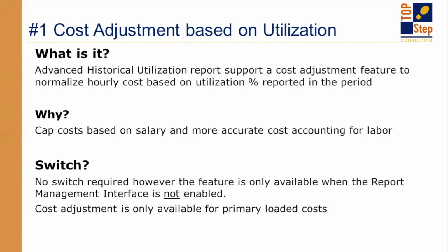I hear a lot of customers wanting the feature that says, I want to cap the amount of cost I can spend. So I want to cap the fact that they're only 40-hour-a-week people, right? This is essentially cap cost, but it's not capping the cost. What it's doing is it adjusts the value of an hour to allow for the total number of hours to equal the same cost as if someone worked just a 40-hour work week, for example.